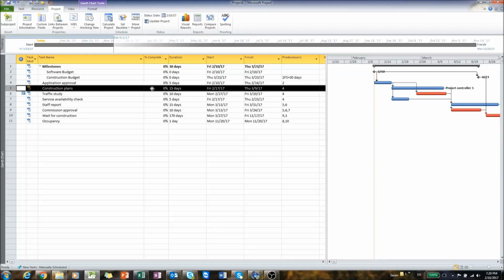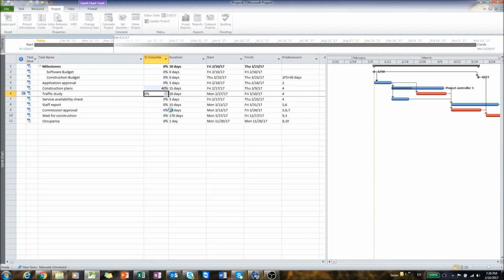So if you go to your resources and ask them how much work they think they've done, or if there is any data that you can use objectively, you can set, let's say, a percentage of completion for that. If it is 50%, that's great. If it's less than that, you put 40% and you see a bar here. So if you're at the end of February and you've done only 40% of the job as opposed to, let's say, more than 50%, this is some sort of a red flag that you can work on. This is another way of tracking the project.